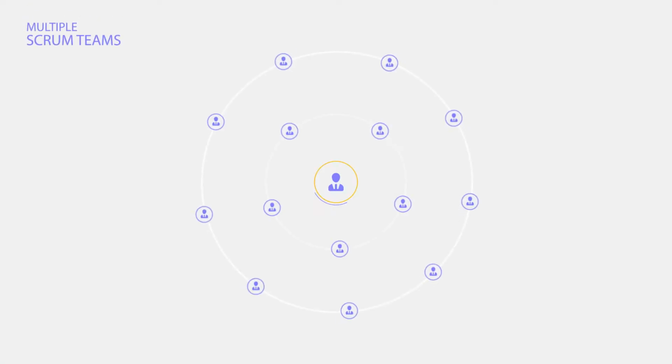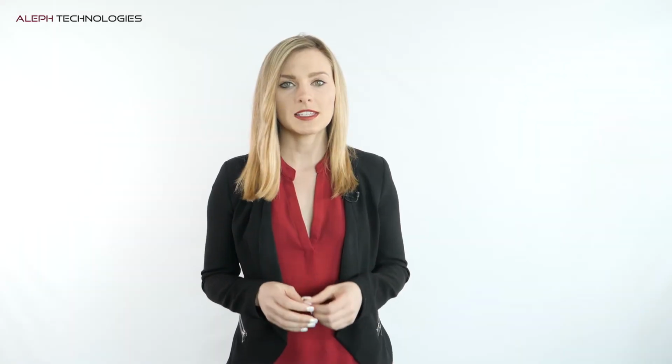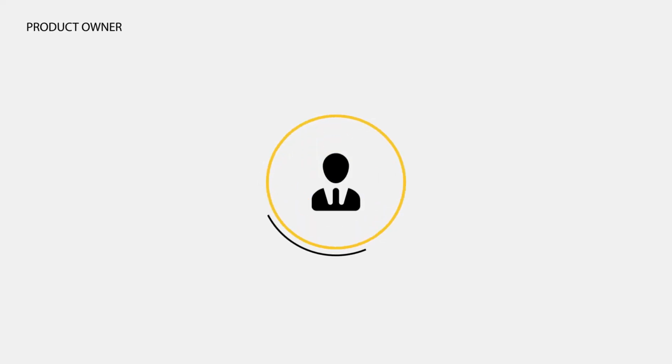Multiple Scrum teams often work together on the same product. One product backlog is used to describe the upcoming work on that product. A product backlog attribute that groups items may then be employed. Product backlog refinement is the act of adding detail, estimates, and order to items in the backlog. This is an ongoing process in which the product owner and the development team collaborate.